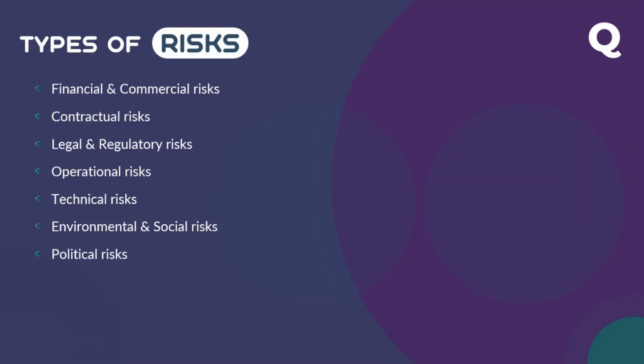Or you can check with your procurement team and ask what they think, how it was in the previous budget, when you prepared a KPI or a qualitative and quantitative analysis, how supplier performance was, how our payment mechanism was. If you ask a contractor and you are a bad paymaster, because you delay payment to the contractor, subcontractor or supplier, that is eventually a risk. In that case you can consider that risk.